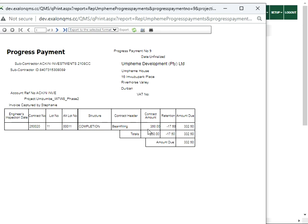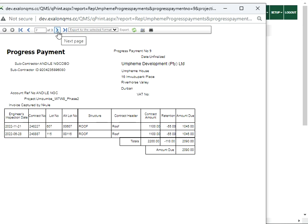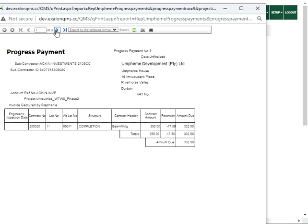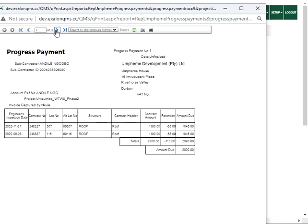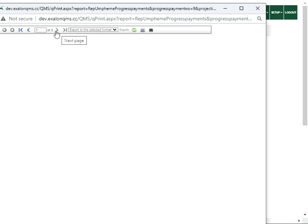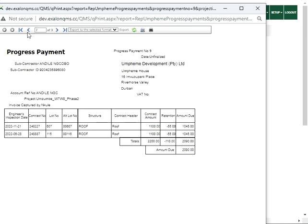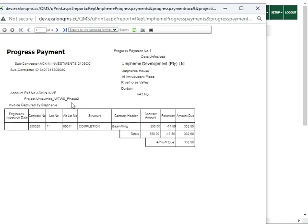So the price that it brings up is the price that you entered when you created the contract. The retentions is the percentage that you entered when you created the contract. And this is the amount you'll see. That there are others for this, for the other subcontractors. There's only two. Now there might be a whole lot for this person, in which case they'll all come up in the same table. This can then be printed and that's how much he gets paid.